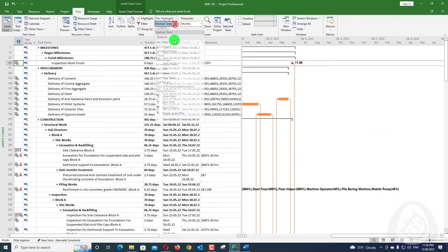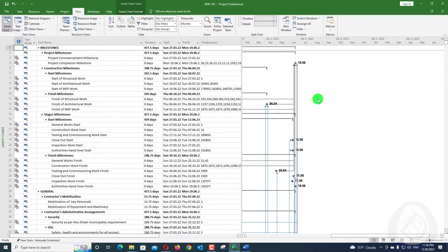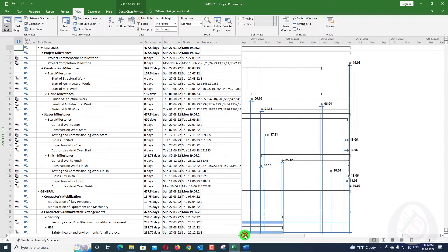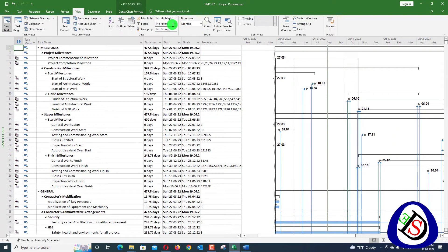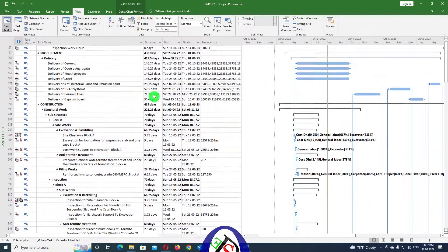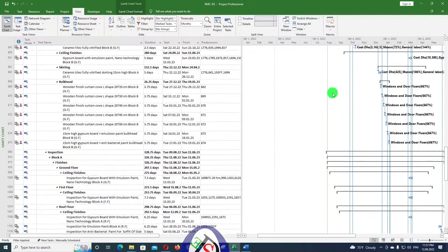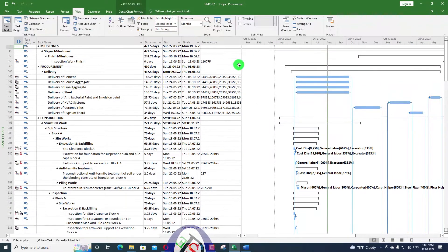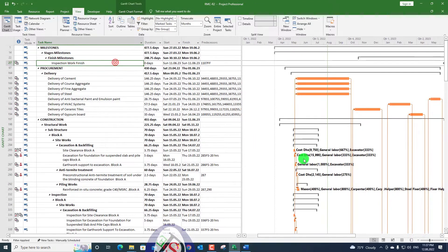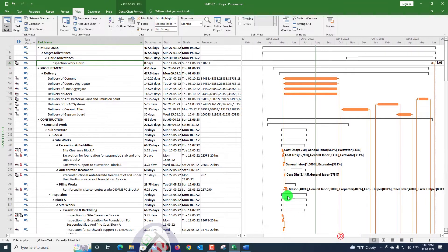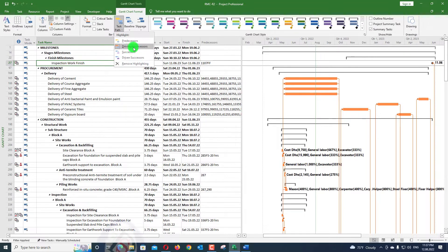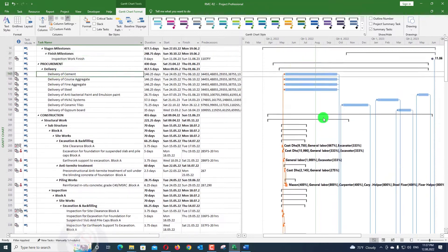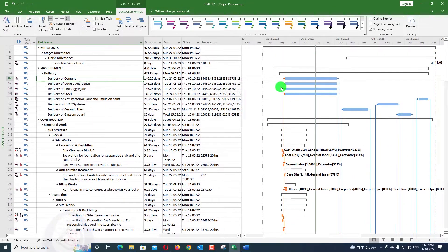To remove the filter, go to View and press 'No Filter.' All activities will then be shown again. You can re-apply the 'Marked Tasks' filter to show only driving predecessor activities. Note that when you select a different activity, only that activity's driving predecessors will be highlighted — no others will be shown. Only the driving predecessors of whichever activity you select will be highlighted.